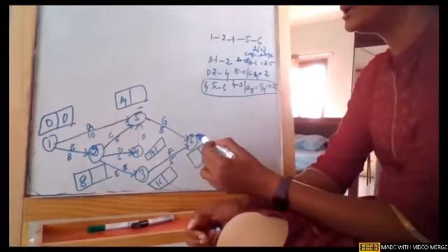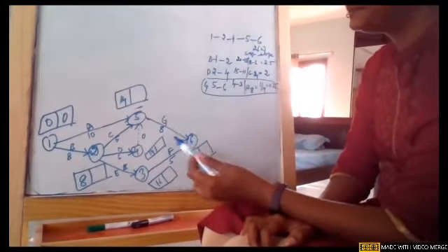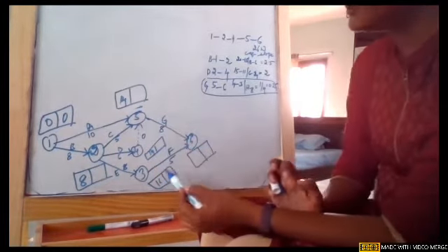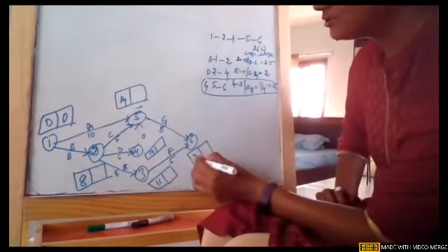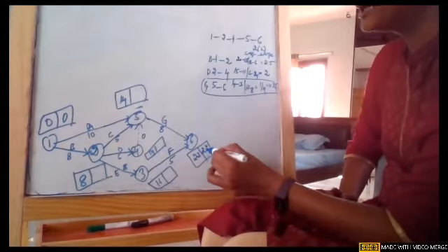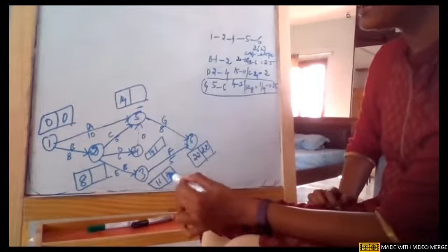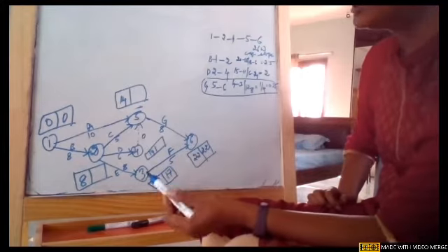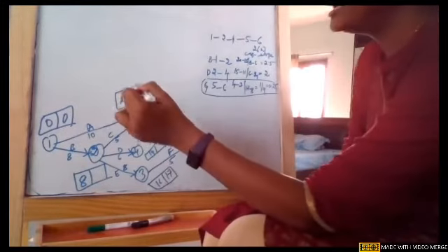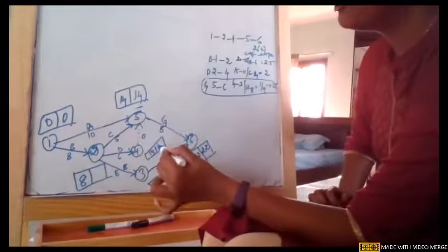So I'm taking 14 at node 5. And then 14 plus 8, it is 22, and 16 plus 5, it is 21. So it is 22. I'm taking the maximum arrowhead, and then obviously the latest at the last node will also be 22. So 22 minus 5, it is 17. Same here, 22 minus 8, it is 14. So near node 4, it is 14 minus 0, 14.